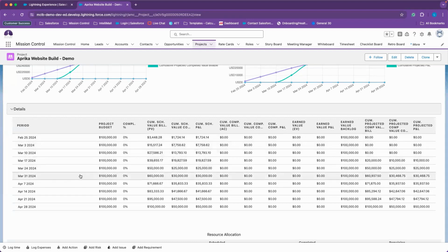By the end of my month here, there's just days that are shared between that week. And that's why it's showing revenue in between. So towards the end of March, the week of March 21st, I would have assumed or recognized 50% of my revenue here. So it's just based on the time period that those actions are scheduled. Oh, no problem, Nick. Happy to help. Yeah, so it's just based off of those working days, and that's why you'll get a breakdown that way.